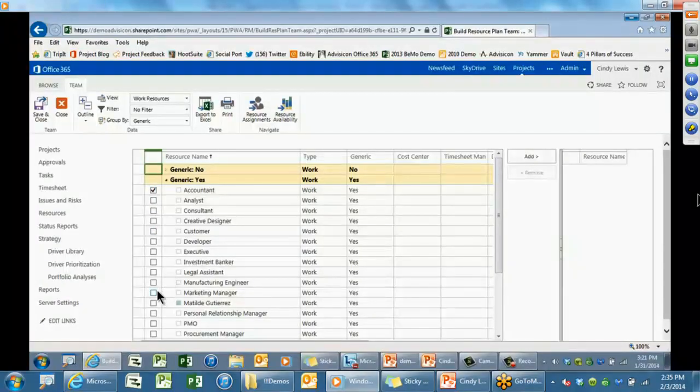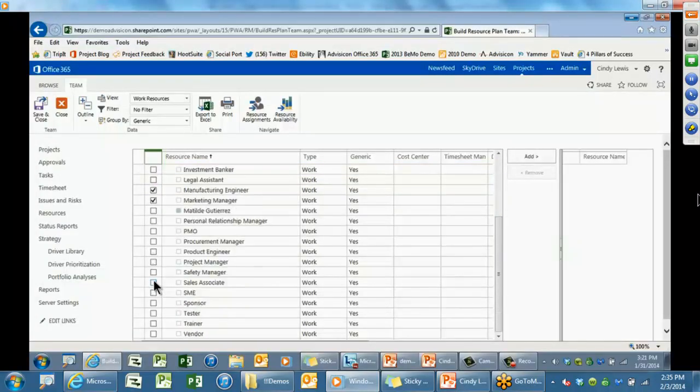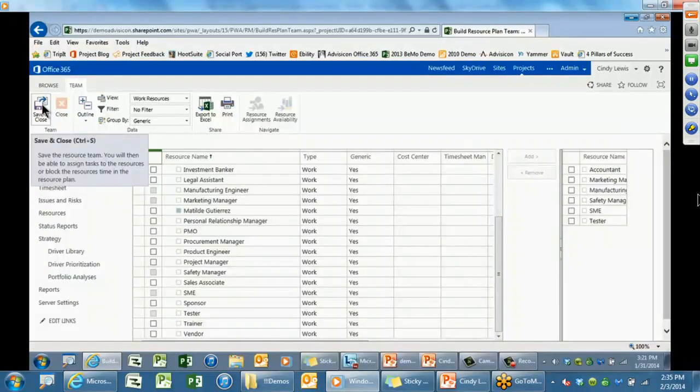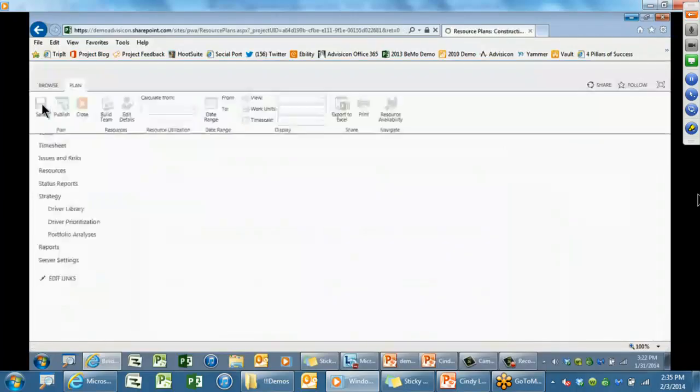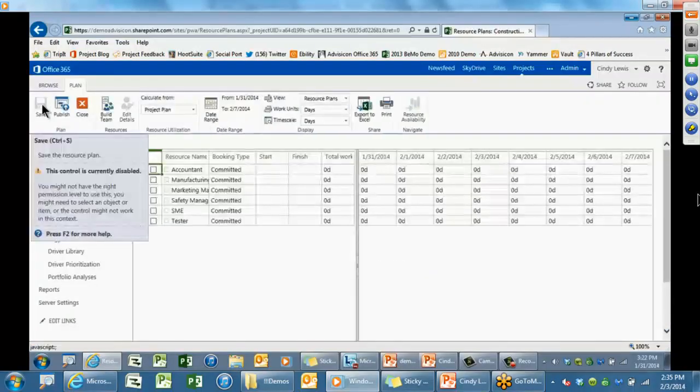Is there a mic back there? Talk pretty loud. The capacity would be decremented, right, if you have administrative time? So, say a month's 160 hours and they're out 2 days, it'd be less 16 hours, right? So your question is, is the capacity changed because of the administrative time? We're talking about the administrative time feature. I'm going to be showing you that in just a minute, so if you could stay tuned. But you are correct. The administrative time feature does affect capacity. So that's another approach. Yes, another question?